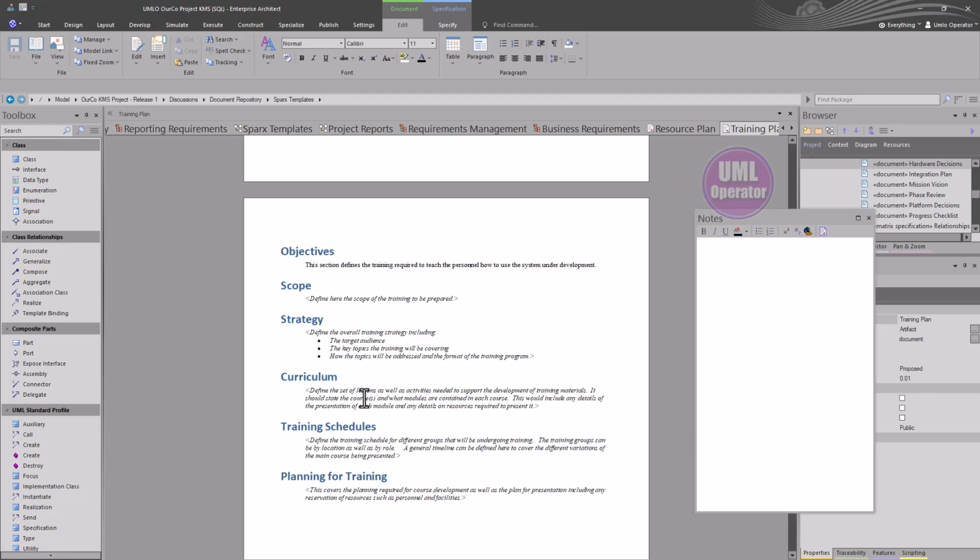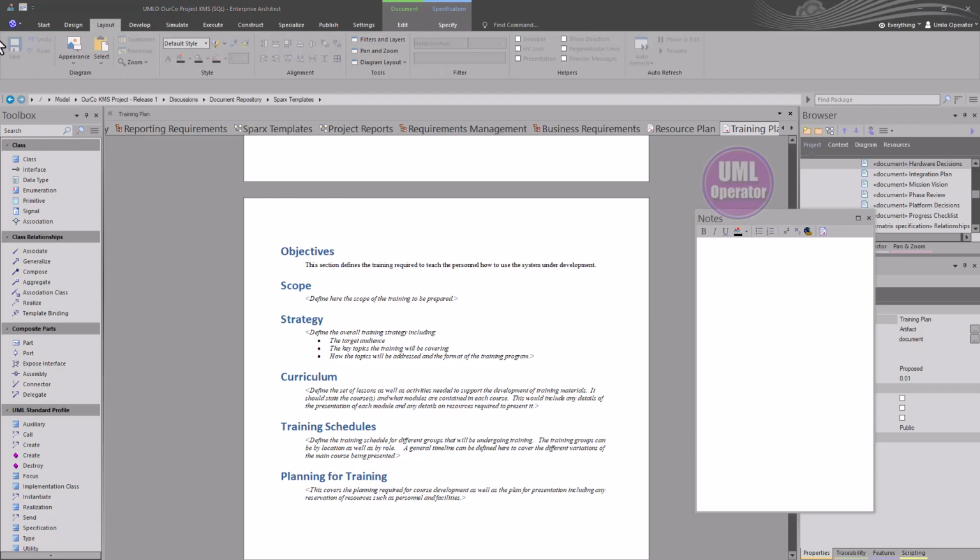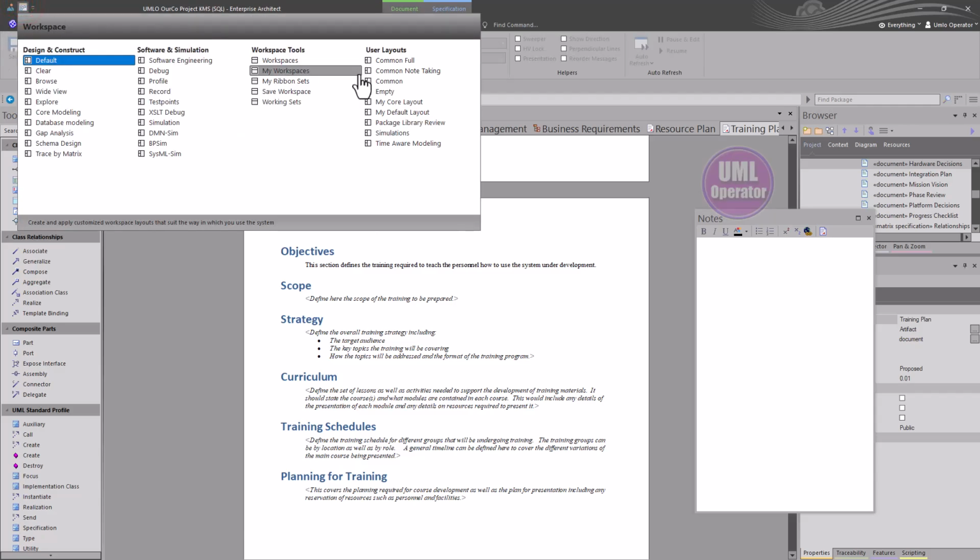This one's critical. You're not going to train everyone at once. You might do a couple at a time. You might feel out the water for the pricing that you may be paying for training, train one, get some lead trainers to help train the rest of your shop, and work out your contractual agreements with whoever your training facility is. And then you're planning for training: when to train, what to train on, and how to verify that everyone is properly trained.